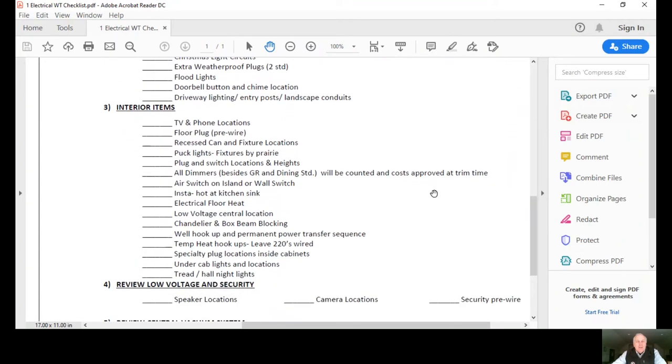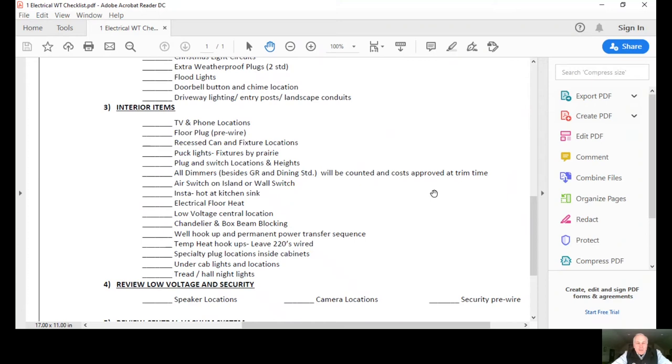Number three, when we get into the interior, all of our rooms are wired for the TV and phone location. I want to make sure we talk about that and get those locations exactly where you want them. The electricians will mark this while they're there and then they go right to work and wire accordingly.